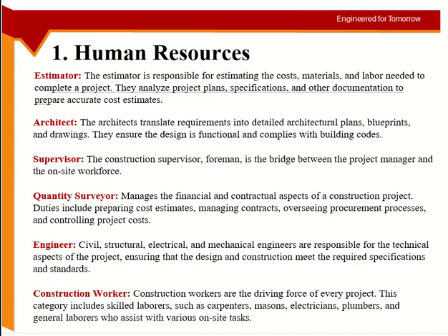The foreman, the supervisor, is the person between the project manager and the labor. So he is basically asking the project manager, what do you want? Then he translates that into something which the people, the labor, can understand. Then you have the quantity surveyor, who is tracking the actual cost of the project. He is doing the survey, how much work is completed, and so on and so forth.